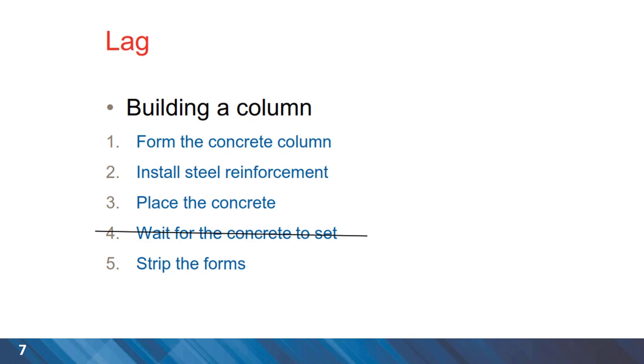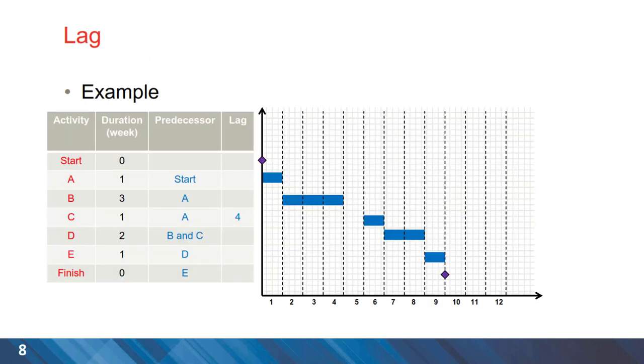So we can illustrate this on a Gantt chart. And obviously we have the start milestone after that activity A with the duration of one week. Then activity B starting immediately after A. However, activity C, which has activity A as the prerequisite, has a lag of four. It means that we need to wait for four days after finishing activity A and then activity C can be started.